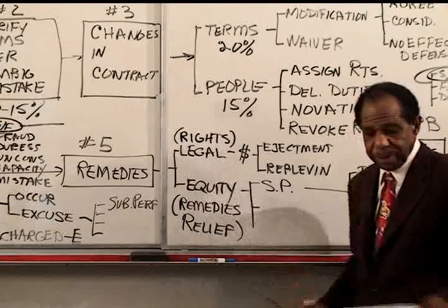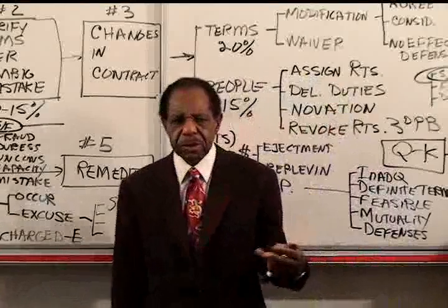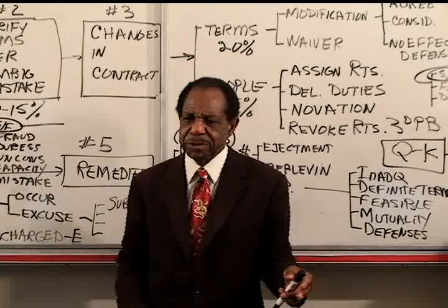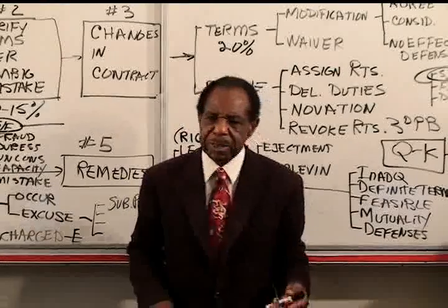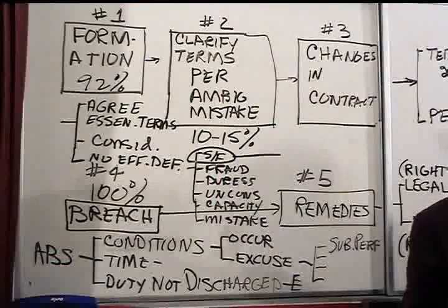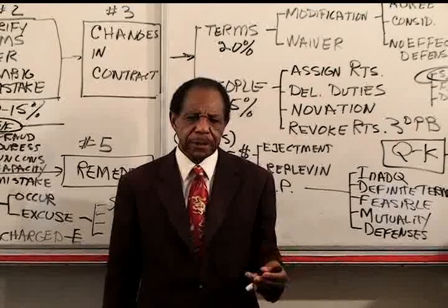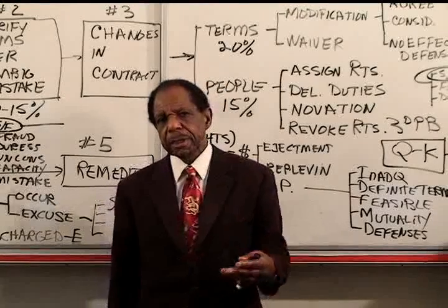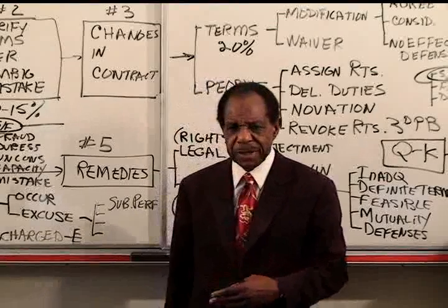As to buyer's rights, well, in this case, they've got a liquidated damages clause that they tried to add to the contract under 207. We haven't dealt with that yet. But if the liquidated damages clause of $1,000 a day is still valid, then they're 5 days late and the seller owes buyer $5,000.